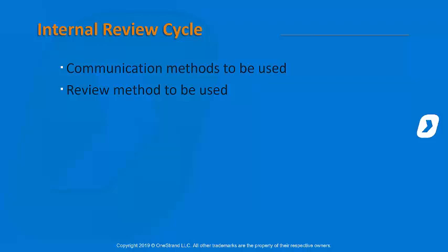Yeah. If we then jump across to an S1000D environment, remembering we're writing data modules now, which are small snippets of information that are fully self-contained. In the ATA world, it's classed as what, a task. Yeah. Correct. So with that, as a data module has been written, it can be issued to QA. So QA can then review that task, and send the information back.